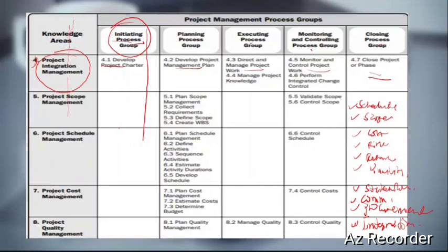And that takes you to planning. So you take your time and plan your cost well. They are telling you in the charter the summary duration, high level: we want to use 4 years to do this job. It's stated in there. It's your job to take your time to go through the activities to check whether the duration stated in the charter will be enough. If not, you go back to them. So you will be doing the detailed work, but they will give you high level information, and that is the charter.